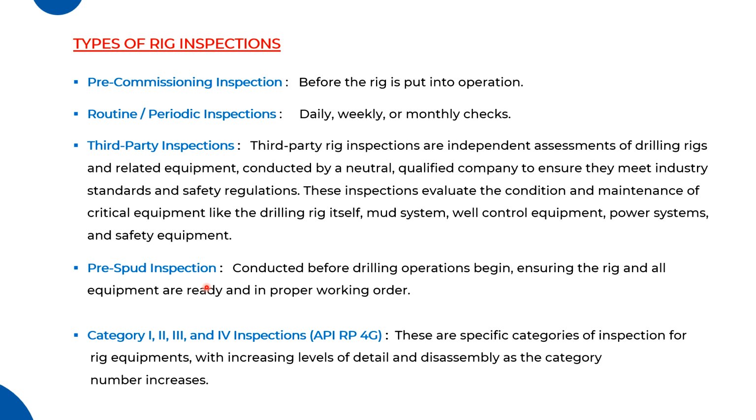When the rig is moved to the new location, the rig cannot start the drilling unless the pre-spud inspection has been completed. And pre-spud inspection is kind of a checklist, and there are around 250 or 230 points, and it varies from client to client, company to company.